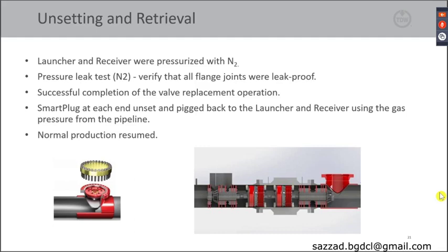After the maintenance work had been completed, the sandwich and tapping valve was recovered by installing a locker ring plus plug into the flange of the fitting shown in the picture to the left. Normally the fitting is and will remain on the pipeline, becoming an integral part of the system. The fitting itself can then be re-entered for future isolation operations if the need arises. However, in this case, with the ESDV rectified, the fitting was later cut out from the receiver major barrel.